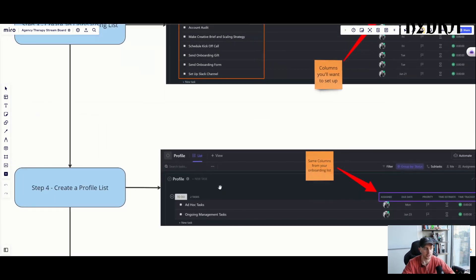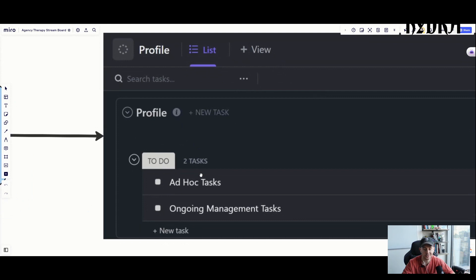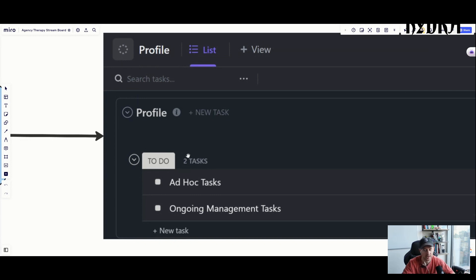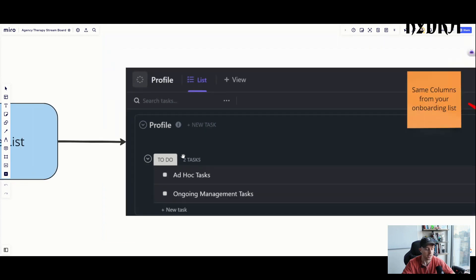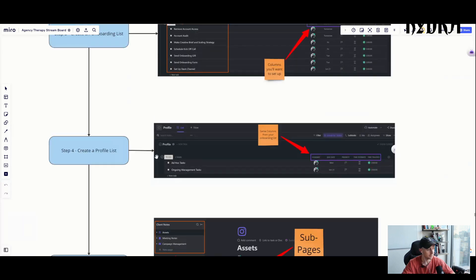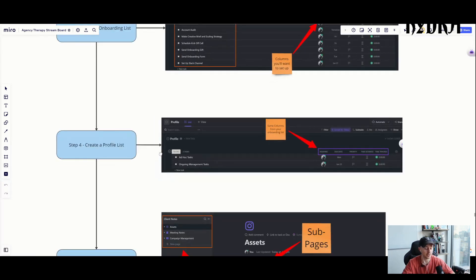For statuses, we only use three: to do, in progress, and done or complete. Those are it. We don't use any other statuses outside of those three. The template will already have those statuses built in, but if you're building from scratch, those are the three you need.